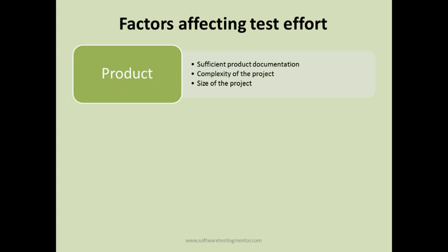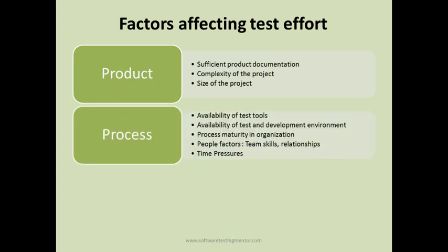If the project is just a simple web application or a website, then the test effort for that will be very little. So depending on the product that is available, the complexity, size, and the documentation, that affects the test effort. Then the process. What is the availability of test tools that will be used in the testing? That's the first factor that can affect test effort. If the tools are available, once you start the testing, it will take less effort. If tools are not available, everything has to be done manually, and then the test effort will be more.